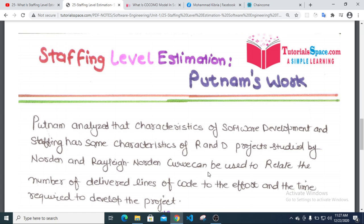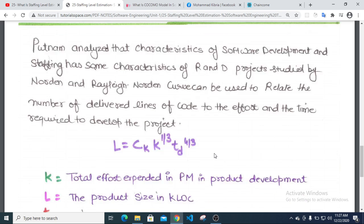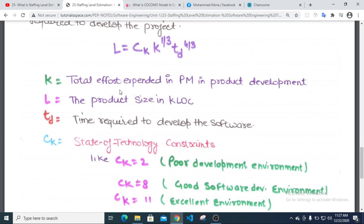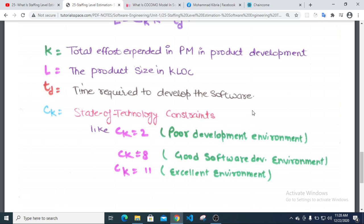Putnam's equation can be used to relate the number of delivered lines of code. PM is person-months — effort in person-months in product development per month. The product size is in KLOC (thousands of lines of code). TD is the time required to develop the software, and CK is the state of technology constant.